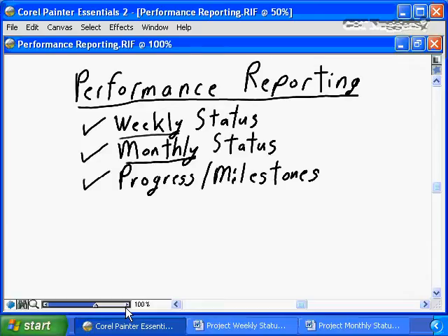So it is an interim, high-level, virtual milestone status report that says, here are the key milestones, 5, 6, or 7 for your project, and here's how we're doing, so that other stakeholders, other people who are interested in the project can have a high-level view of how well the project is doing, and more importantly, have that high-level view of when the project will be completed for the organization.